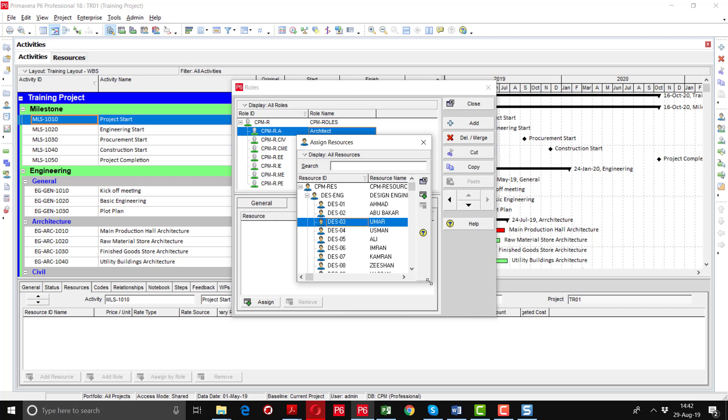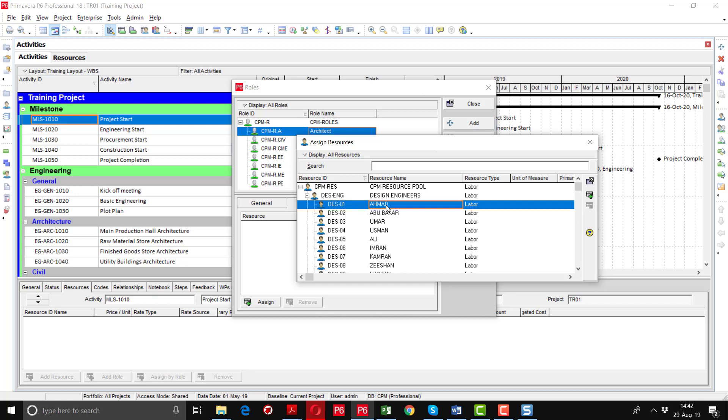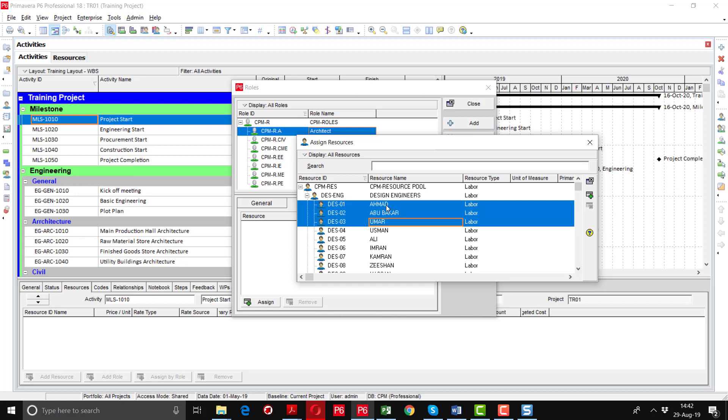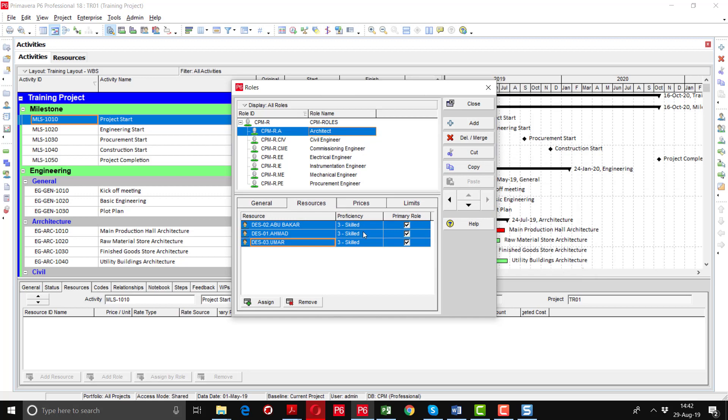The resource pool is open here. If I consider design one engineer, design two engineer and design three engineer are architects, I will just select three of these resources then click assign button and these three persons with a name of Abu Bakar, Emad and Umar are assigned the role of architect.